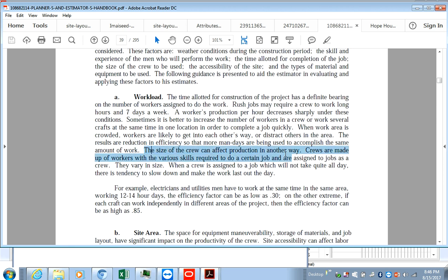So basically, the size of the crew. It doesn't mean that if you throw so many resources at a task that you will complete it in the required time, if you're doing acceleration, or trying to crash the critical path. Why? Because the productivity levels will still be the same. No resource can ever perform at 100%. Even plants will never perform at 100%.